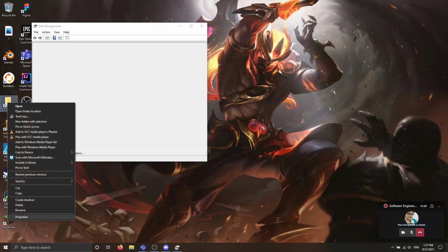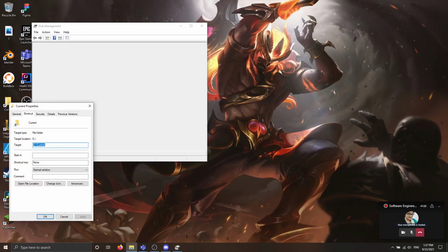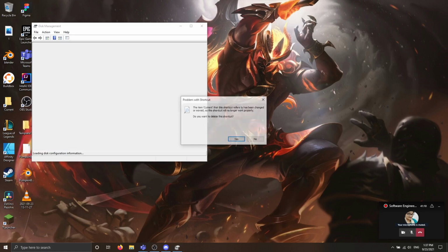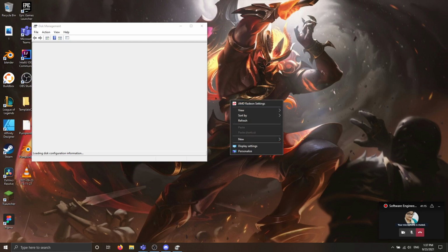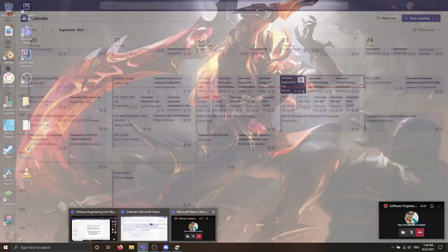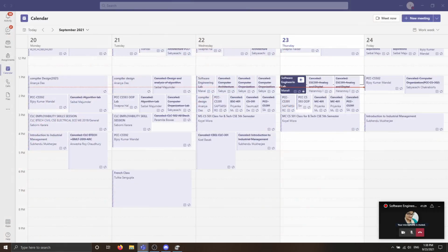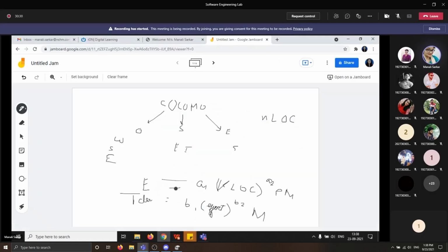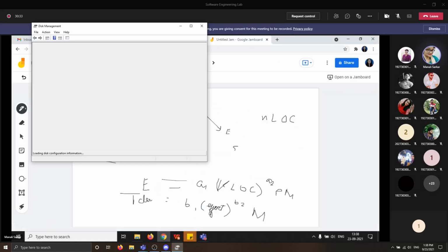So basically, see this example where the size of an organic software product has been estimated to be 32,000 lines of source code. So here 32,000 lines. You need to calculate in kilo lines of code, so that's why we are taking that. See here, effort we know. What is the formula of effort? It is given that it is organic software. So we know that in case of organic COCOMO, as I said in the last slide.